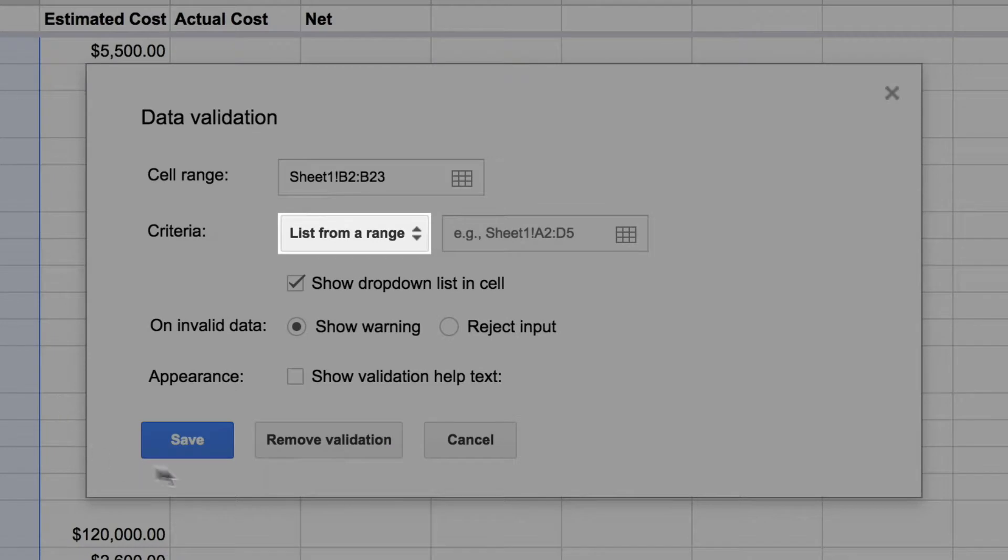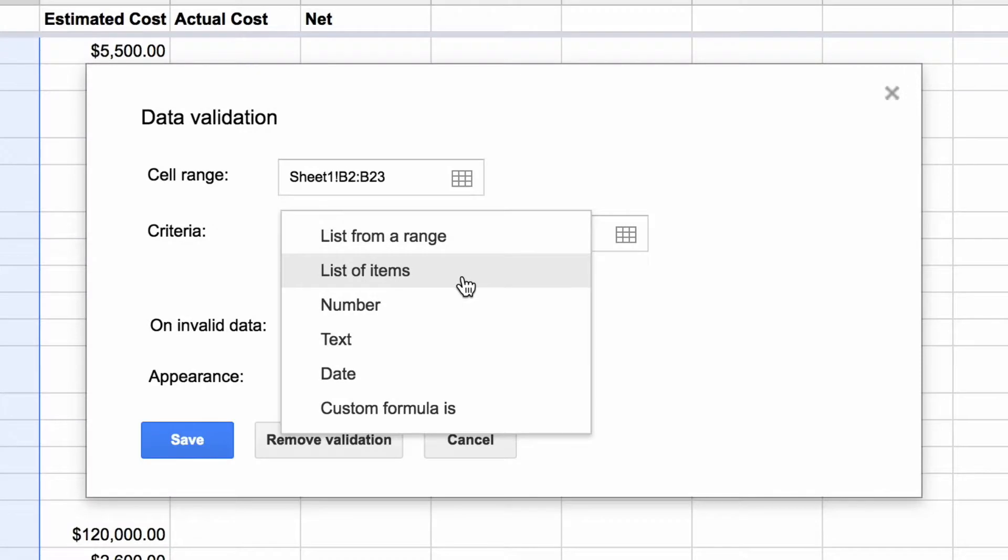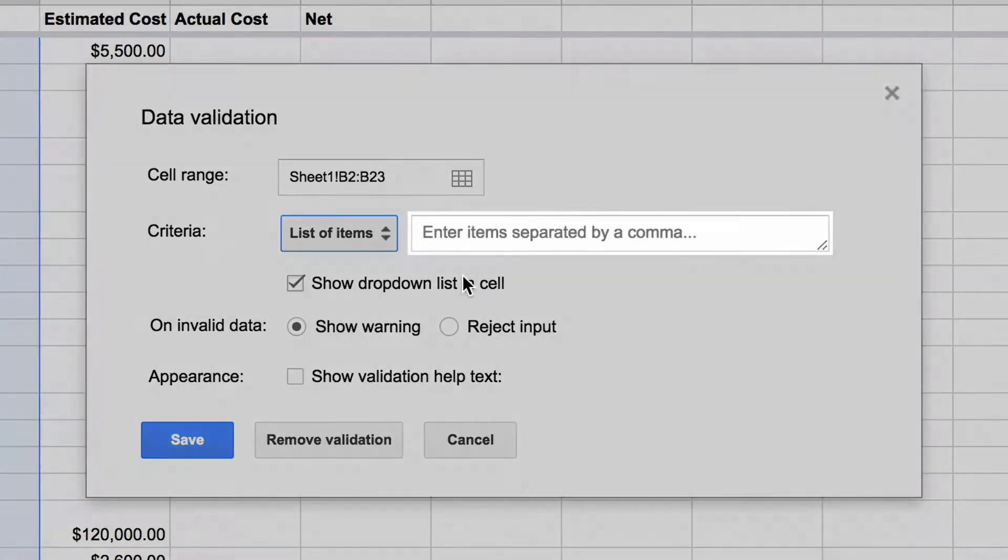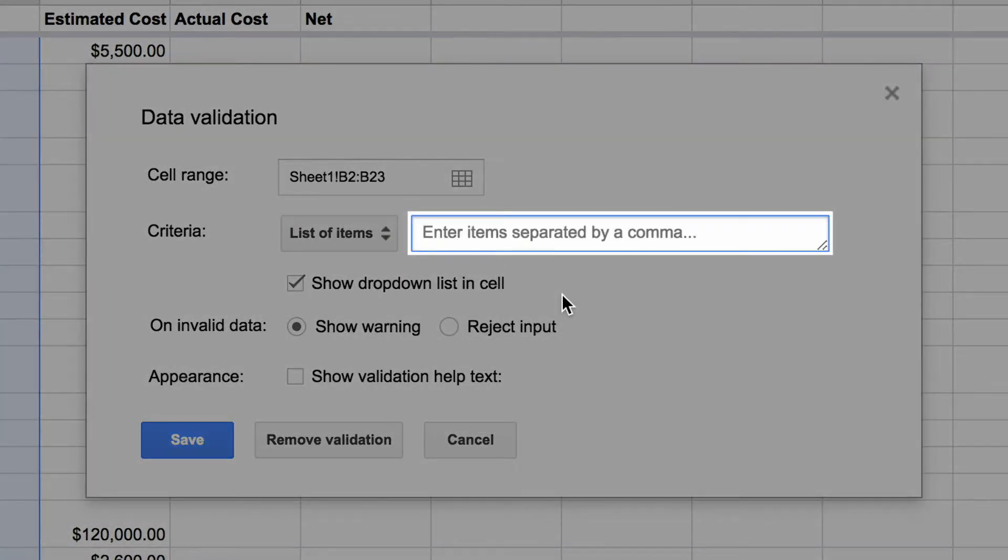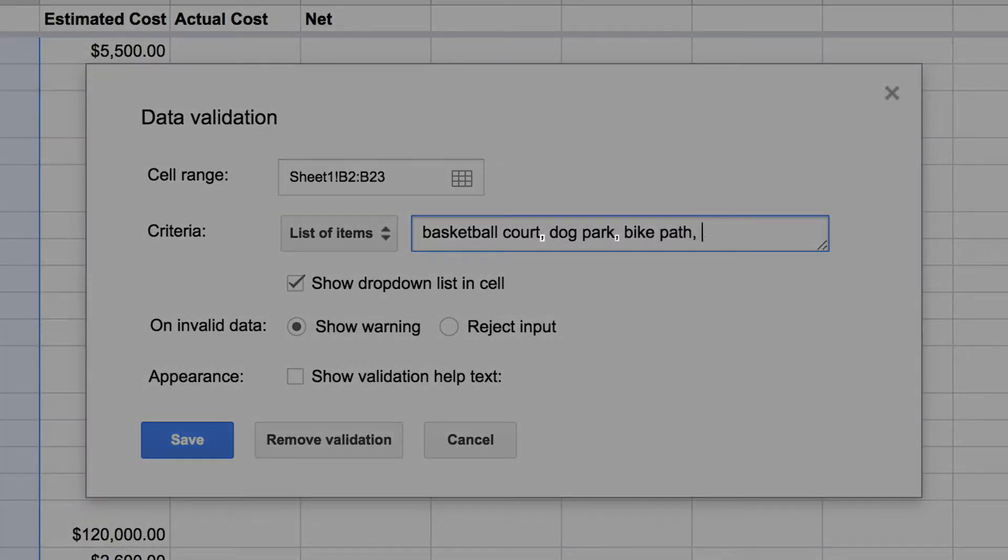Select List from a Range. Then select List of Items. Type in category names for the items listed in your sheet, separating each with a comma.